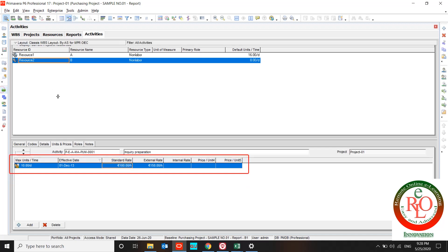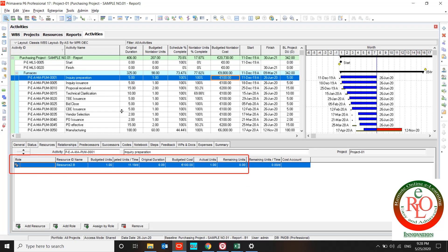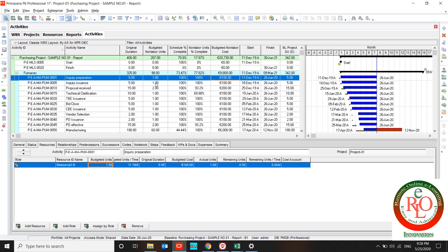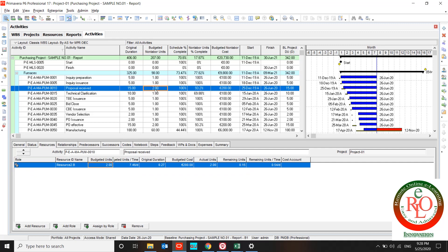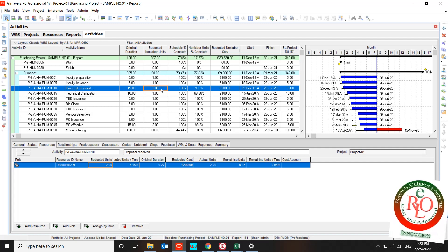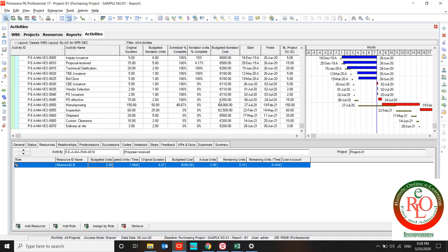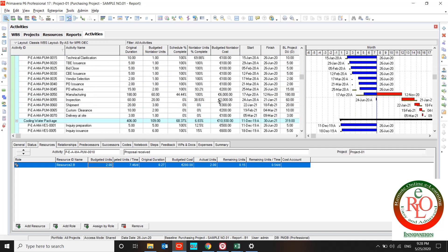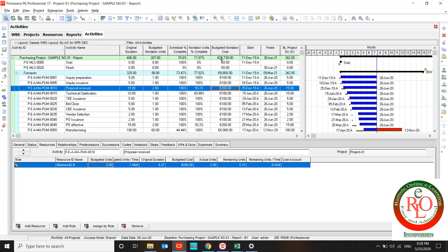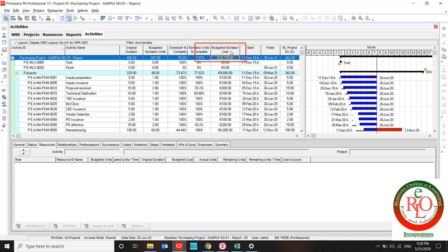Inquiry preparation uses 1 hour and my budget cost is 100 EUR, so my budget non-labor cost is 100 EUR for this. Proposal received budget non-labor unit is 2, so my budget non-labor cost is 200 EUR. And according to this calculation, my project budget non-labor cost is this digit.